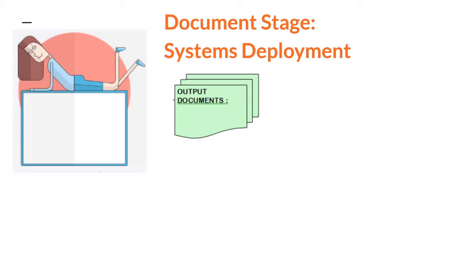The development team will create a deployment plan and a configuration plan for the customer's system. They will create a project plan listing all of the external contractors involved and associated tasks. So there may be external people coming in to set up racks and install wiring and install systems and servers and PCs and Wi-Fi networks and firewalls and routers in the customer environment.